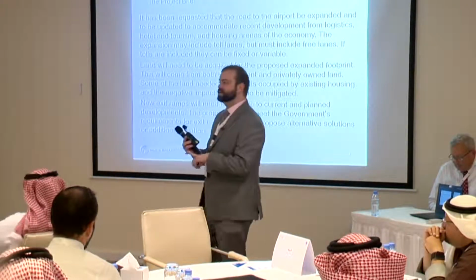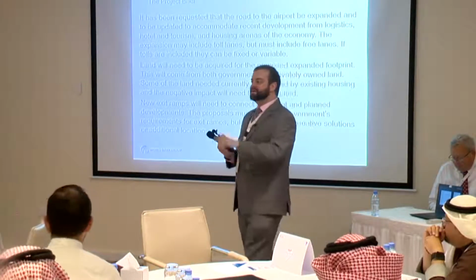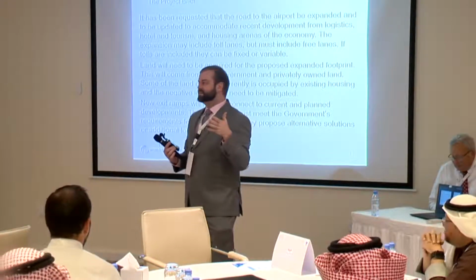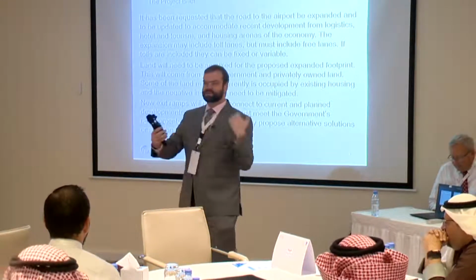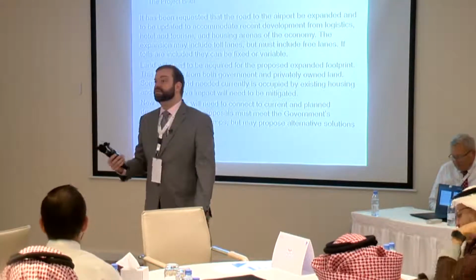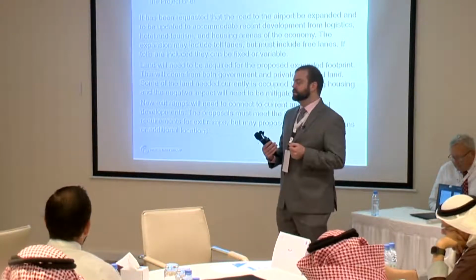You should already have the economic study. You should have the feasibility analysis done. You should have already gone through all the checks with the various agencies and ministries in the government before you are even drafting this TOR, right? You're including that information just for information for the company, letting them know that everything is ready to go.